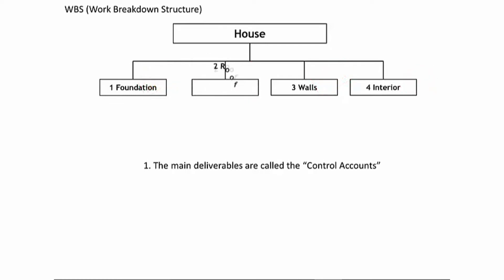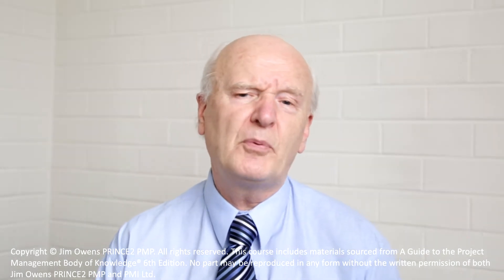You might think I've made a mistake by placing the roof before the walls, but I haven't. The key lesson here is that the Work Breakdown Structure is not time-ordered. It can't be, because it won't be until we create the schedule that we'll know for sure which order the products will be delivered. When I create a Work Breakdown Structure, I generally organize it in approximate delivery order — but in obvious cases like this, common sense applies.